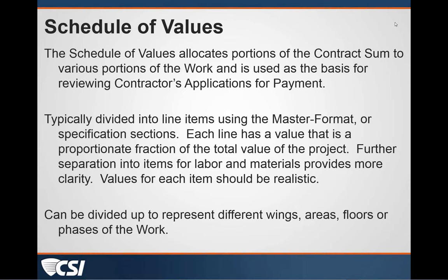One other thing I would add from maybe a North Carolina perspective, certainly maybe a federal perspective, as we break down these applications, the schedule of values: if you have historically underutilized businesses that are a part of the project with a mandate or goals of participation, line items need to show up in the application that exactly match those contracts with those businesses, so that if and when audits are done, the auditors are able to tag the contract amount for the historically underutilized business directly to an amount in the pay application.